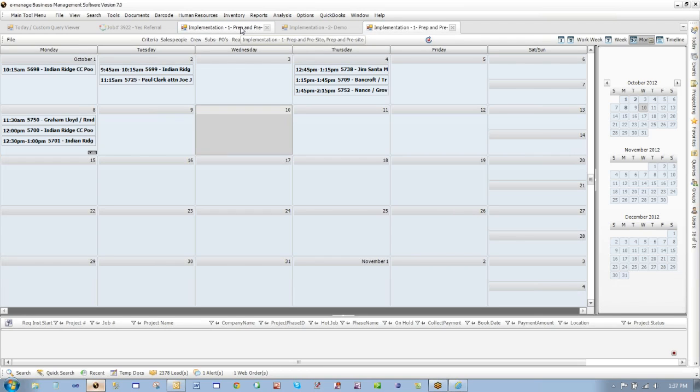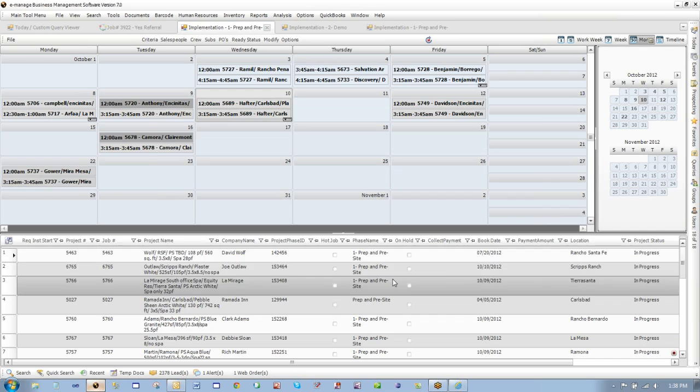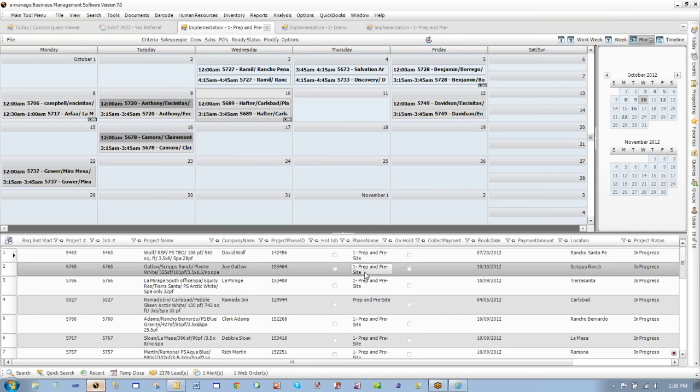But the reason why it happened was the first pool company we ever did had, like, I don't know, 12 or 13 paper calendars strewn across a couple of desks, right? It was pencil and white out, and each one of them was a separate phase, right? So that's why we did this. We made it so that you can basically set up to 30 calendars in different phases. And you'll see down here, this is prep and pre-site. So if I look down here at the bottom, this grid right here, this has only prep and pre-site phases that need to be scheduled.